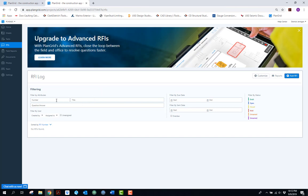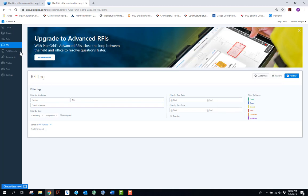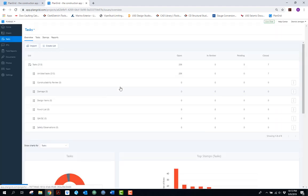The RFI functionality within PlanGrid is something we really only utilize when the general contractor is also using PlanGrid, since RFIs are assigned to different trades. On this particular job the GC is not using PlanGrid, so we don't use the RFI functionality — instead we use our own RFI form through field reports.